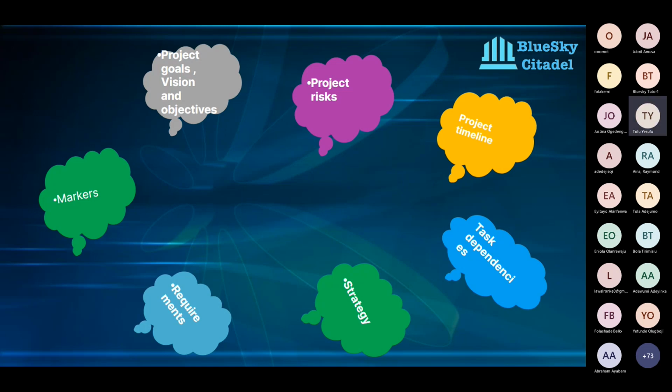You want to understand when Tolu's team is starting to grind pepper. I know my British colleagues will call it pepper. So when is Tolu's team going to start grinding the pepper, so that Ben's team can start to get the pot ready to boil the pepper? Something like that. I'm just trying to use very similar things that we do on our day-to-day to relate to things like this for better understanding. So you want to make sure that those dependencies are mapped out as well.